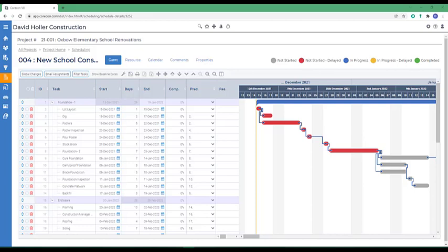A project schedule is continually evolving. Seldom a day goes by where there's not a change or adjustment to a project schedule. For this reason, setting up a good solid initial schedule and then saving that schedule to baseline allows you to compare the actual and current schedules throughout the project to what you originally planned. In the schedule that you're viewing here, the baseline has not been set. We want to make some adjustments before we begin the start of the project.